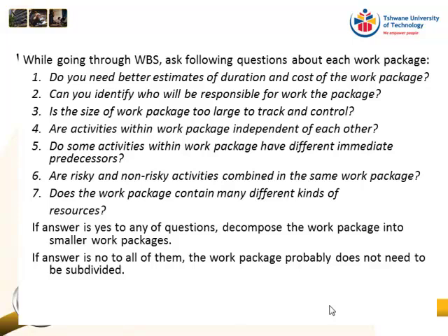And you know that you've broken it down far enough once you can make one person responsible. Why do we want to make one person responsible? Accountability. Accountability. All right.